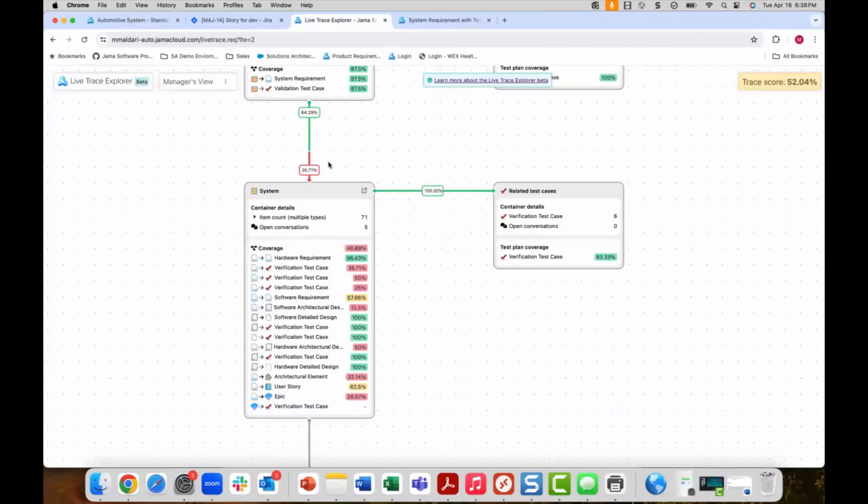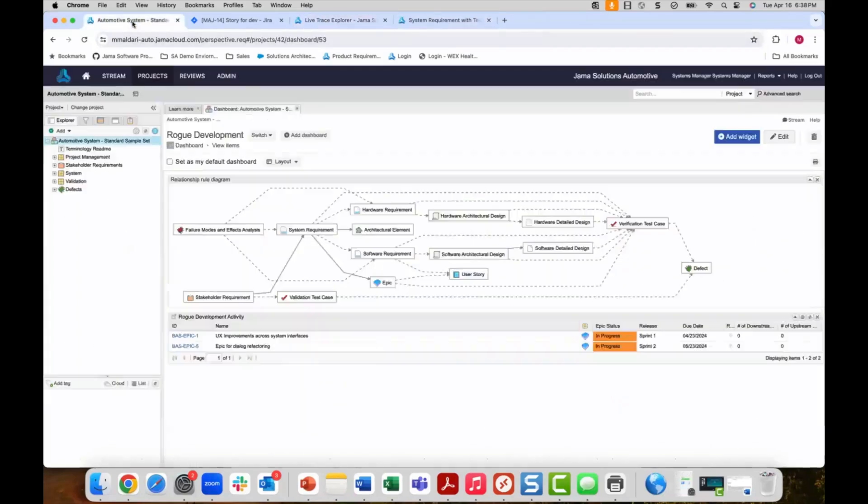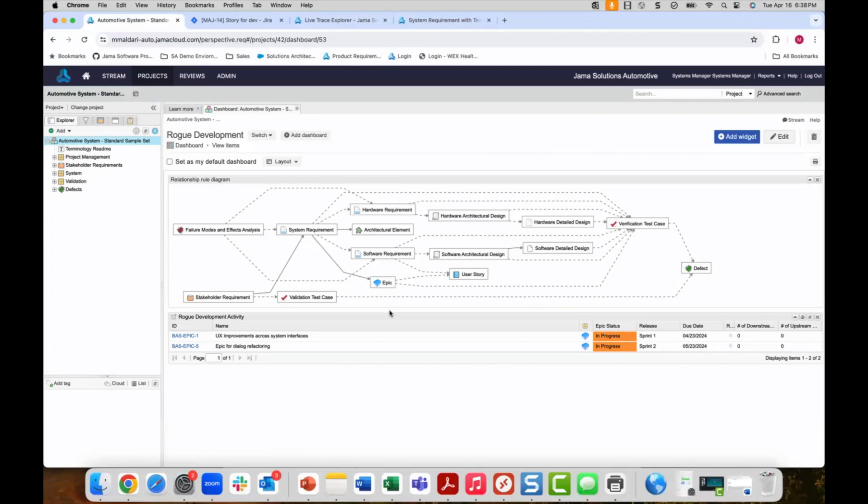How do I identify rogue development activity? Rogue activity can be tracked by a query that is looking for missing upstream links, as in this case epics to system requirements.